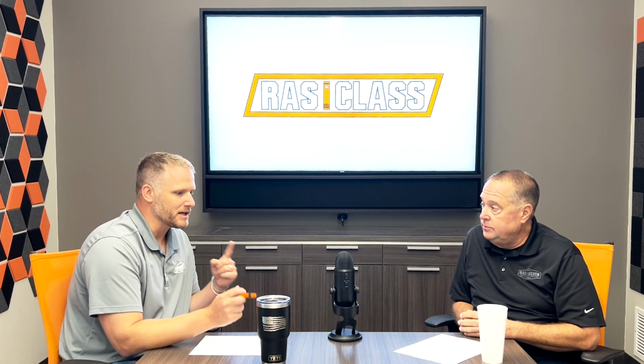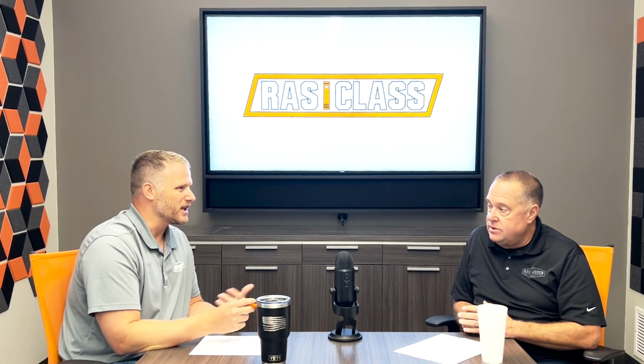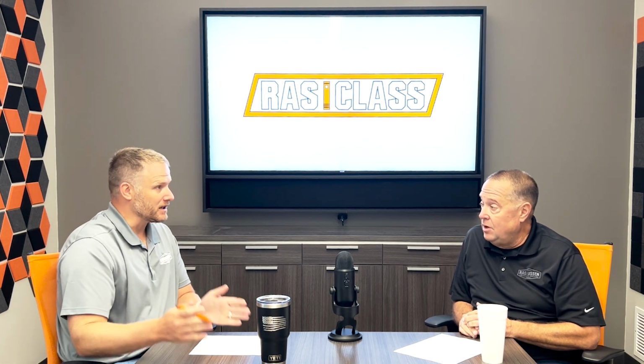And then do you touch base with their mechanical contractor to explain to them what's all needed? I will. Or do they usually have a pretty good idea? Most of the time they have a pretty good idea, but I'll usually talk to the installing contractor. Cool. And then we prefer to do startup on all of these units because they're going to be run. We want to make sure that they're running the way that they're supposed to be run. Right. Well, we're firing them to make sure they run before they leave, right?